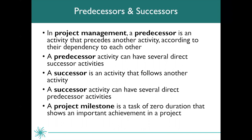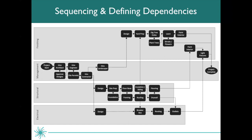A project milestone is a task of zero duration that shows an important achievement in a project. I always like to put project milestones in for my project start date, my project end date, and any major decisions that need to be made along the way. This is what it looks like when you are sequencing and defining dependencies — you can build this out in something like Visio. The level two work breakdown structure, the main buckets of work, are down the left-hand side: finishing, management, structural, electrical, and it shows what order the work needs to be accomplished in. Here's the project start milestone, then hire an architect, then approve designs as another milestone, then hire the engineer.